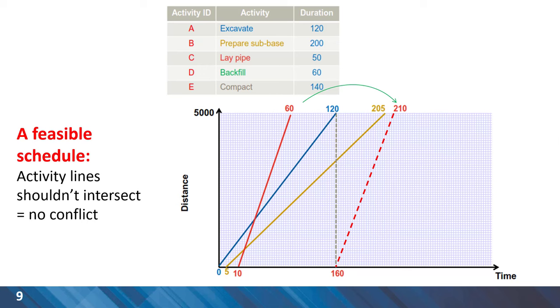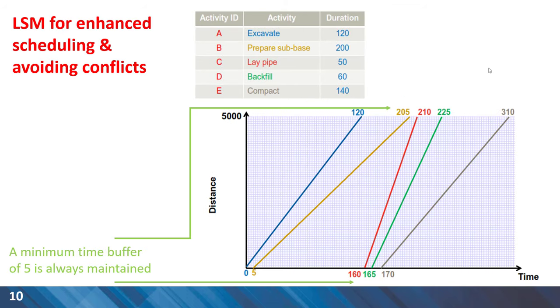With the same principle, we can have the schedule for all five activities. The rule of thumb here is to maintain the minimum buffer of five days at all times. For slower activities with less production rate such as activity B, considering the buffer for the start time is appropriate. However, for fast activities with higher production rate such as activity C, we need to consider the buffer for finish time.